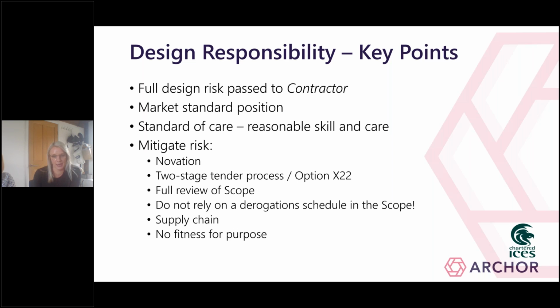Contractors obviously have to consider how they are engaging with their supply chain, and to ensure that any design risk is passed on where it can be, and also to engage with the supply chain at the earliest stage, so that design issues can be ironed out as early as possible. And finally, the correct standard of care must be applied to ensure that there are no fitness for purpose obligations, whether those be express or implied.